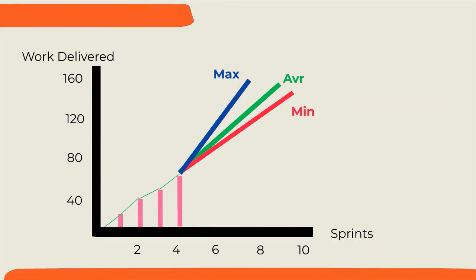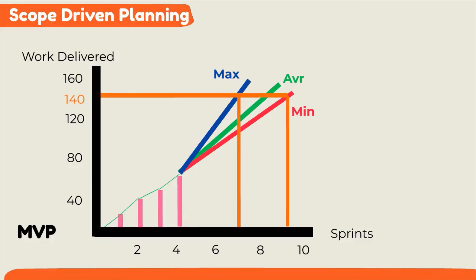Another way to use sprint burn-up charts is with scope-driven planning. If a stakeholder asks the product owner by when the team can deliver minimum viable product, product owner can look at user stories that fit in the MVP and see how many story points. Assuming it is 140, we draw the lines to the intersection of delivery lines. Product owner can tell the stakeholder MVP will be delivered between sprint 7 and 9.